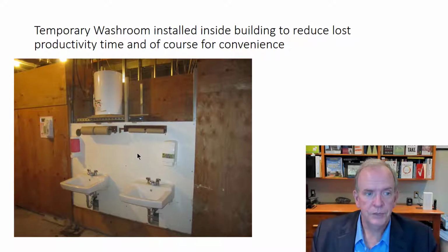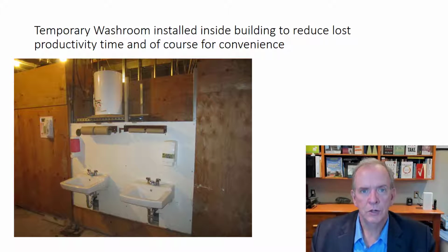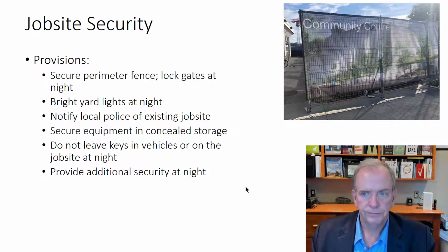Temporary washroom. So this is actually in George Brown College's waterfront campus. So they set up temporary washrooms inside, because they looked at it, well, if they're going to go all the way downstairs and then out to the outhouse, the temporary washroom, better we'll just set up a temporary one where the existing washrooms are going to go. And so they did it that way.